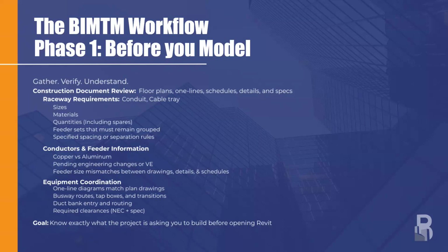And if we begin modeling before we have these key decisions identified, and this gets back to my experience, you're going to model it once. Oh, we've got a delay of information, so now that initial modeling is broken. Oh, we got updated and approved submittals now. Well, now that changes our layout again.